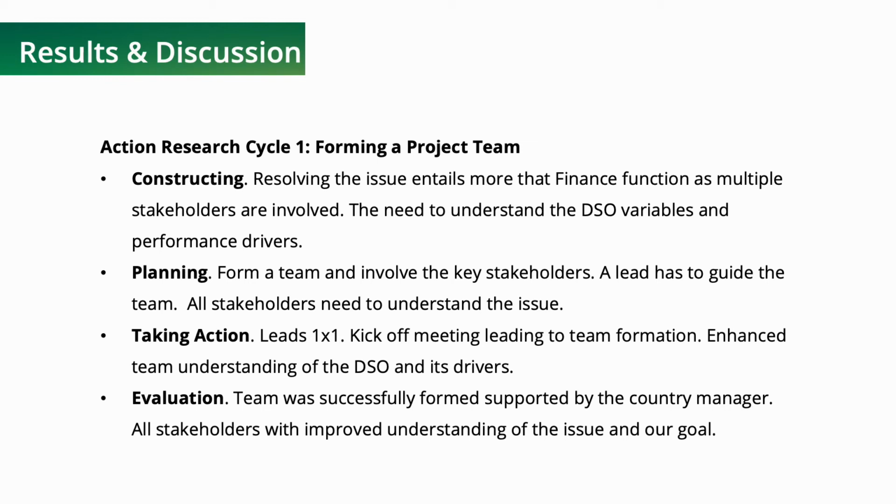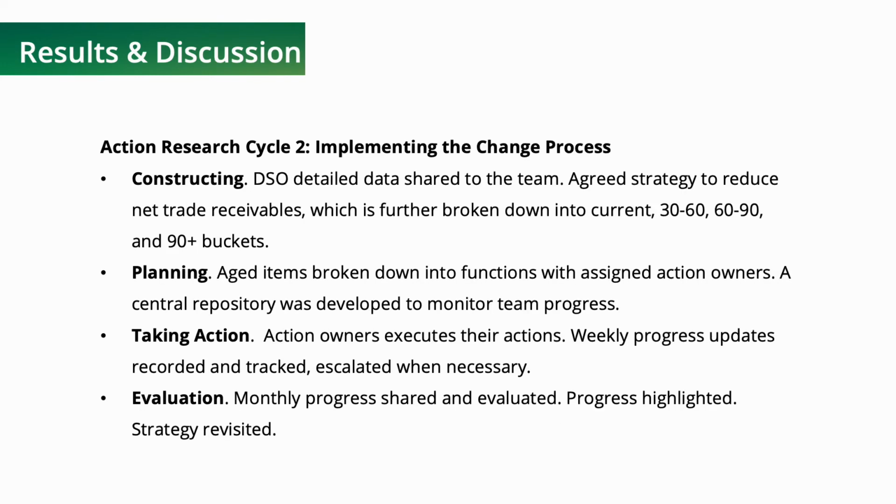The team also agreed to have a monthly DSO update and a weekly action progress meeting. During the evaluation stage, the team was deemed to be successfully formed with the full support from the country manager, and all stakeholders now have a better understanding of the cash collection issue and the goal we need to achieve. The second action research cycle involves implementing the desired change process.